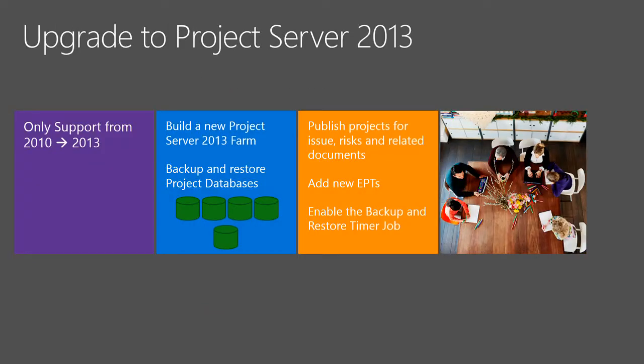You can easily build a Project Server 2010 farm just by using a VM. It doesn't have to be anything fancy, because you don't really need to keep anything running while you're doing that. Also, after you've upgraded, you have to publish all your projects so that the issues and tasks on all your project sites are updated. You can add any new EPTs, and there's one timer job that needs to be restarted. But otherwise, you can upgrade from 2010 to 2013 relatively easily.